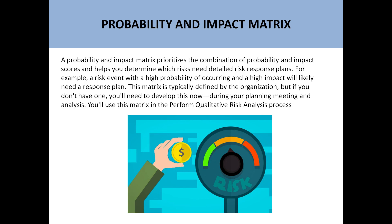Whenever we talk about the Perform Qualitative Risk Analysis process, in this process we identify the risk and define the probability and impact so that we can do risk response planning. Probability means the chances of occurrence of that event. For example, if you have identified a risk ABC, you will identify what is the probability of that risk occurring — for example, there may be a 50% chance that this risk will occur.